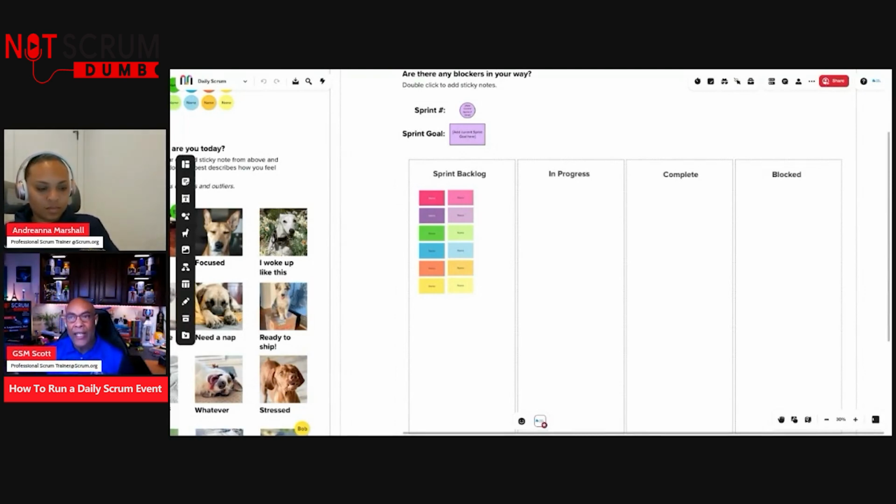We can do that and say, hey, the developers came up with this idea. Why don't we give a detailed update at our daily scrum in terms of, hey, I'm working on this. I feel like I'm going to complete this by such and such a date. It would definitely be done before sprint review. It definitely would not be done unless I get some help from other people. It's just deep diving into things that we don't do on a normal basis.